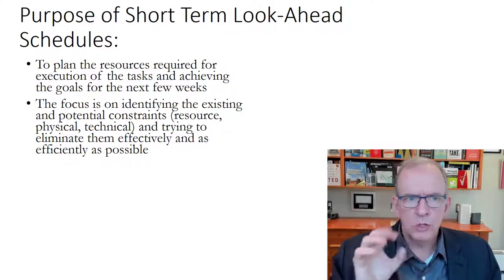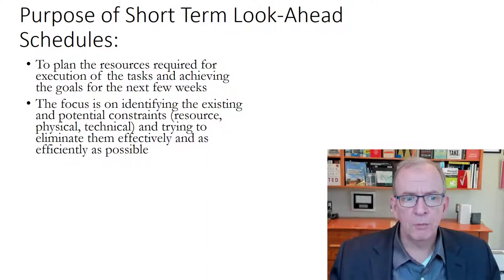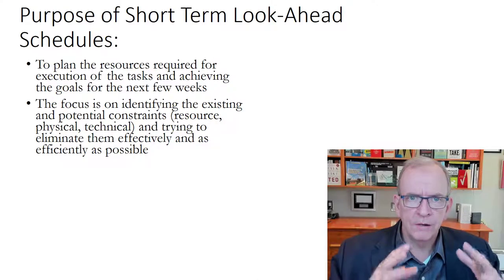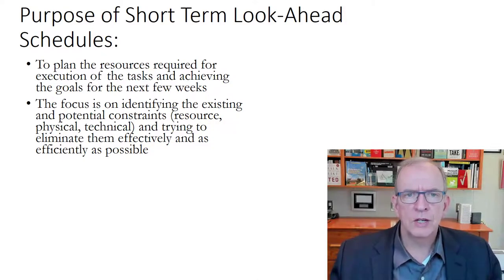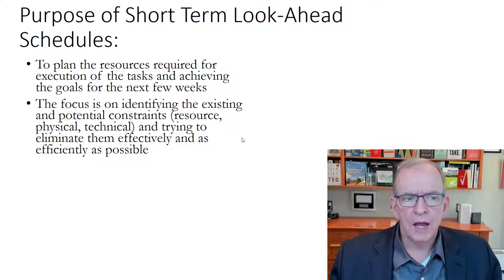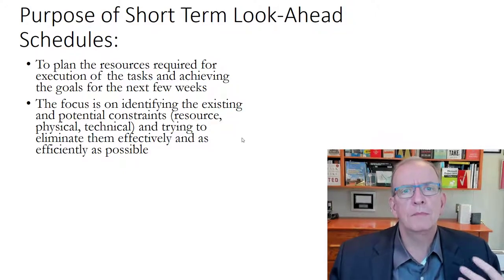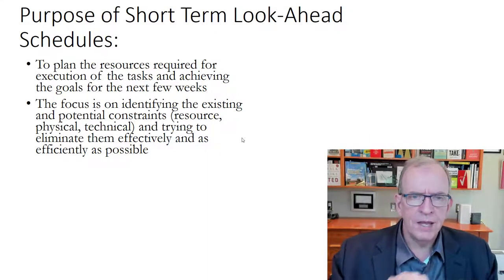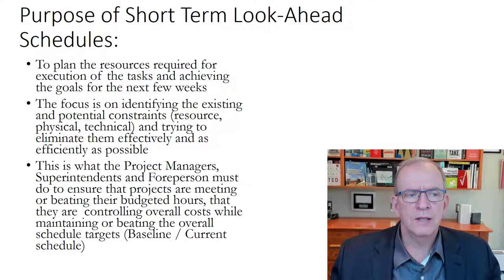When we're doing the short-term look-ahead schedules, at that point we have procured those sub-trades and we are trying to make sure that those sub-trades are going to fit the actual schedule allotments that have been made. The focus is also on identifying any potential constraints that may be coming up and trying to make sure that if we know about them far enough in advance we can remove those constraints so that they don't prevent us from being able to complete the work.